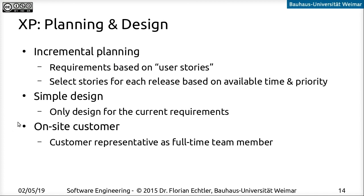A key idea in Extreme Programming regarding customer involvement is that we always have a representative of the customer as a full-time team member. This is quite difficult sometimes — if the customer is a small company, they won't be able to dedicate an employee full time. So the customer might only be involved for each release, but ideally in a larger project we always have a customer representative on the team.